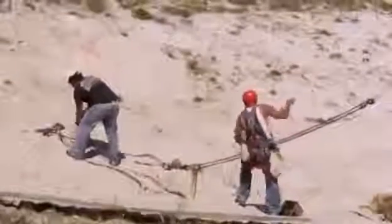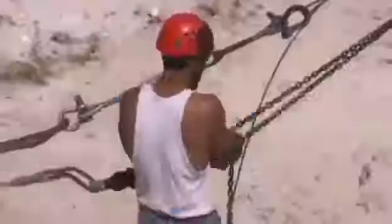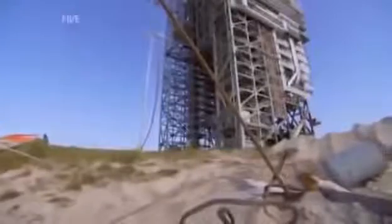We're going to try to pull in the first temporary guy wire and maybe get it tensioned up. The towers are now vulnerable to the winds and could collapse. The team quickly anchors the wires into their new temporary location. No one can be sure they'll hold once tension is reapplied. Slowly, they increase the tension on the lines to nearly 3 tons. Both wires hold.